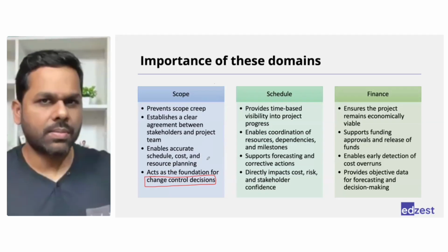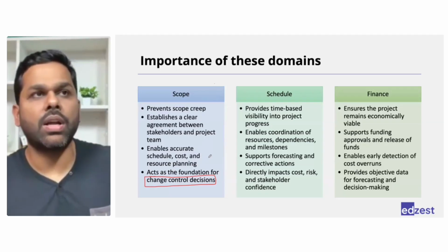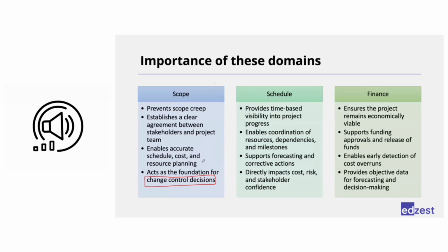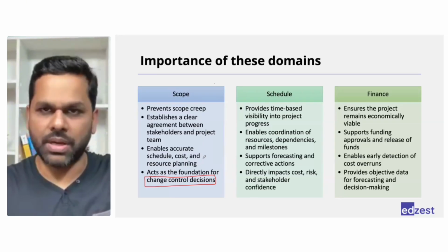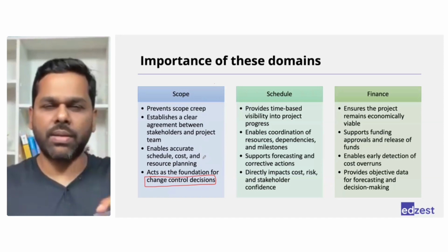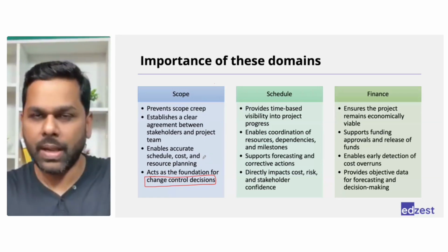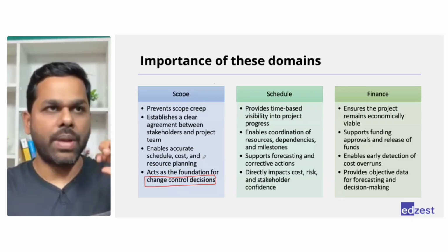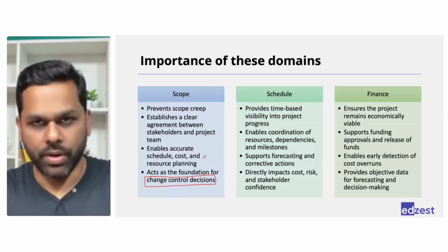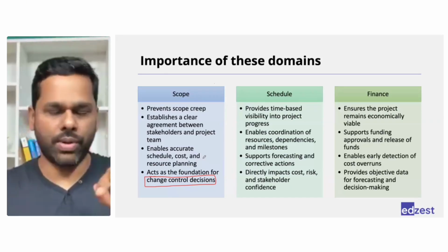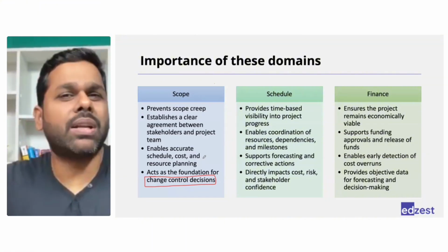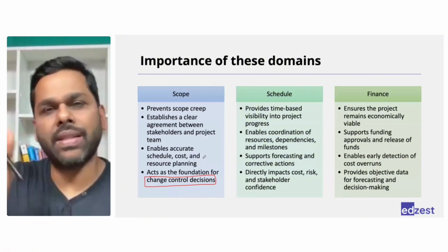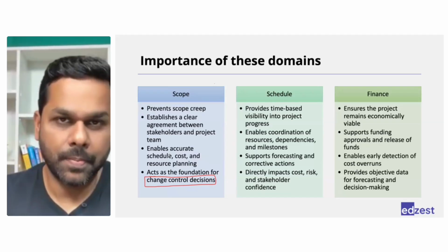You will always need to raise a change request because as a project manager, you cannot directly make the changes. All the plans that you create are discussed with team members and approved by sponsors or management. So whenever you make a change, it is very important that you inform everybody. You cannot make it on your own. You will have to seek approval and then only you can do it. So it is always better to submit a change request, get it approved, and then make the changes.